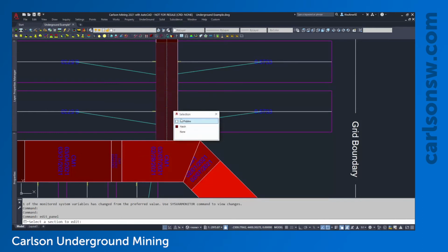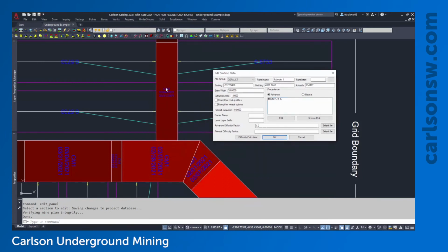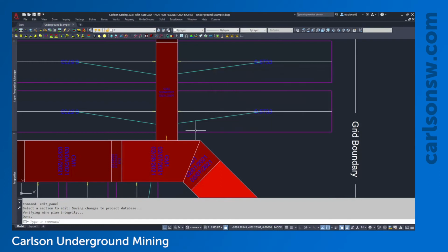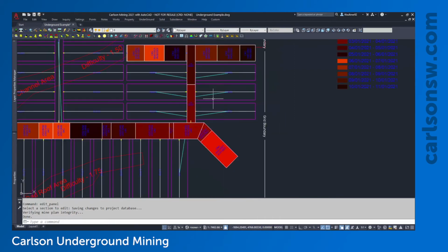And if you pick on the center line there, I'll see the reason here that this was delayed is because this panel cannot start until we complete mining of main 2 beginning to the first pinpoint. So those automatic delays are taken care of, and as we add additional precedence rules, we don't have to worry about manually delaying the start date. So it's a good way to just ensure that you don't mine anything before you can physically access it.